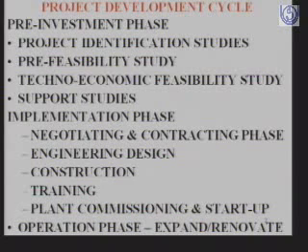Then you have the engineering design, where the engineering consultants do the design for the project. Then you take up the construction of the project, and while the construction is in progress and towards the end, you train the people so that they are ready when the project is ready for commissioning. And then you have the planned commissioning and startup of the project, and after the project is started, you have the operation phase of the project.